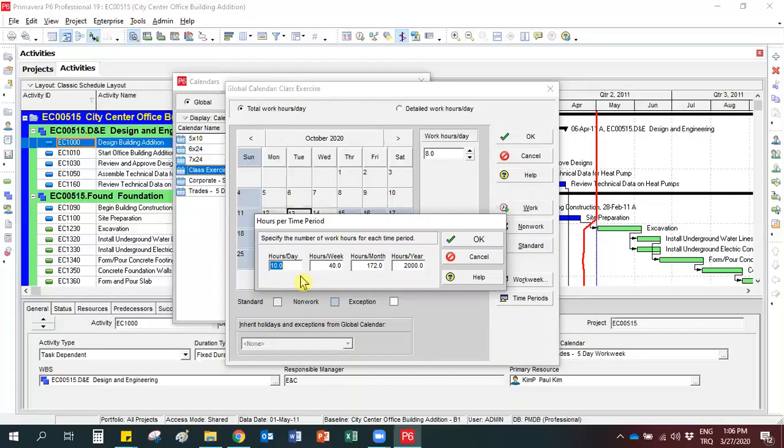Therefore, it means that 1 day equals to 10 hours according to Primavera. If you assign a 1 day duration to an activity, it will take 8 hours from the first calendar day, and it will take 2 hours from the second calendar day. As a result, your activity with 1 day duration will take 2 days in the calendar. When this is the case, you may get some weird scheduling results.